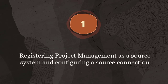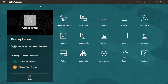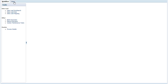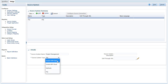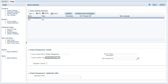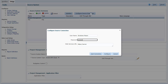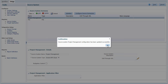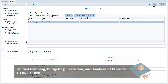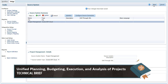Step 1: registering Project Management as a source system and configuring a source connection. Navigate to Data Management and select the Setup tab. I'll add Project Management as a source system. With Project Management selected, I'll configure the source connection. The integration user defined in the connection must have the required roles and privileges for the integration jobs to complete. For more information, see the security configuration required for this integration topic in the Unified Planning, Budgeting, Execution, and Analysis of Projects Technical Brief. Link is in the description of this video.